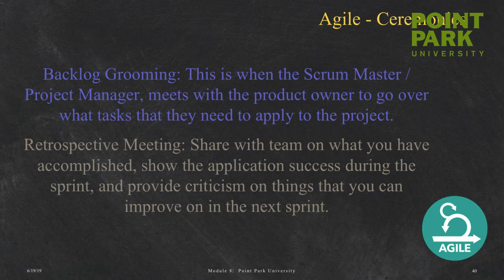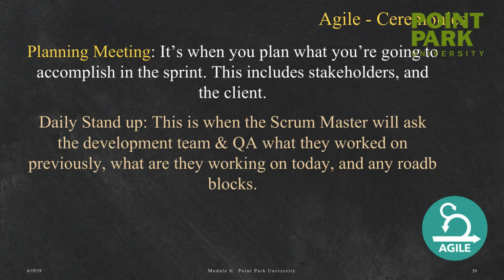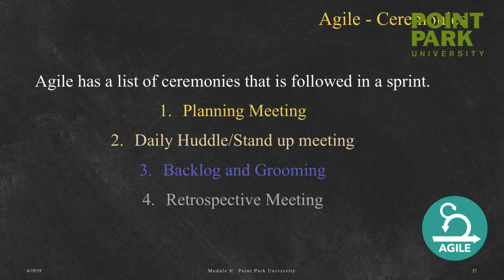I will talk about it because I didn't say anything about it here. I thought I did, and I'll go back. So I talked about how it's Monday, you have your planning meeting. So you actually start working on your code on Tuesday, Wednesday, Thursday, Friday. That's 4 days right there. Those 4 days at 8 hours are 32 hours. Now, if you're that person that has 50 hours, your day's pretty much over, your week's pretty much over because you've already utilized your time.